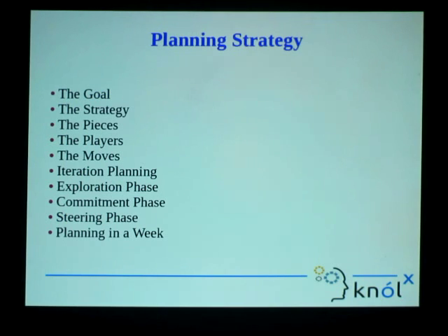We should. But keeping in mind that we don't have the acceptance criteria right now. Because that can come later on, you can tell them that okay, we don't have all the details for this task right now, but we are estimating it to be this much complex. But later on, if it changes, you can always change your estimation. It's a kind of adapting process. You can always change it later on.